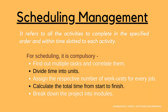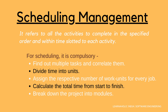The fourth activity is Scheduling Management. Scheduling Management in software refers to completing all activities in a specified order and within a time slot assigned to each activity. Project managers define multiple tasks and arrange them keeping various factors in mind. For scheduling, it is compulsory to find out the multiple tasks and correlate them, then divide the time into units, assign the respective number of work units per job, calculate the total time from start to finish, and break down the project into modules.